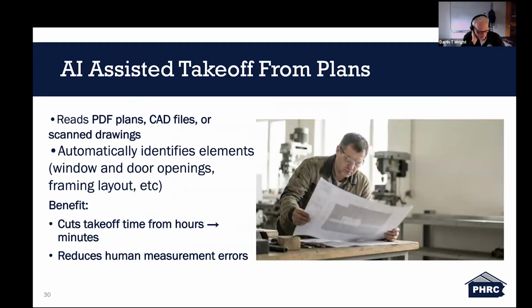AI-assisted takeoffs and plans. AI-assisted takeoff allows users to upload plans and quickly generate material quantities. This reduces the time required for manual measurements and improves consistency. However, these outputs should be reviewed carefully.